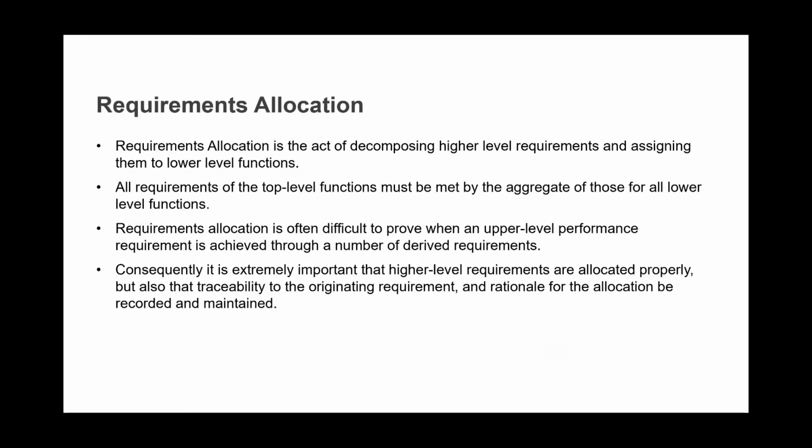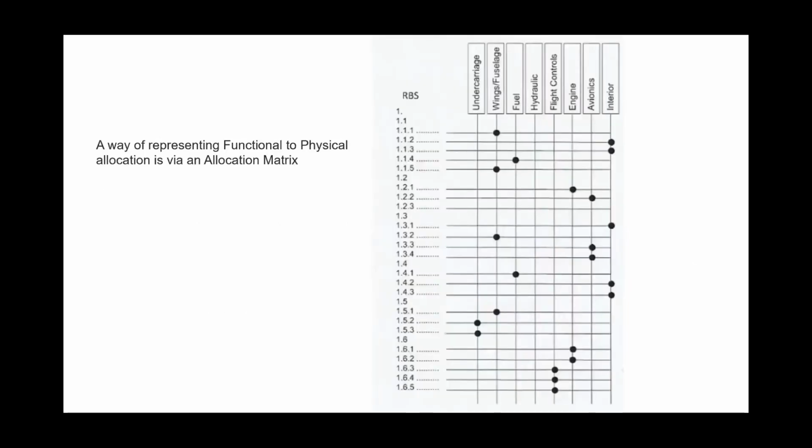Talking about requirements hierarchically, once we have identified all the requirements, I'll skip this and move to this one. Once you have the requirements breakdown structure, where you have all the requirements identified with hierarchical allocation numbers, on the right-hand side you have a physical allocation, a physical system, and each requirement is attached, linked, or allocated to that physical system. I've seen that done on projects where a design package or a design element was used as a physical allocation.